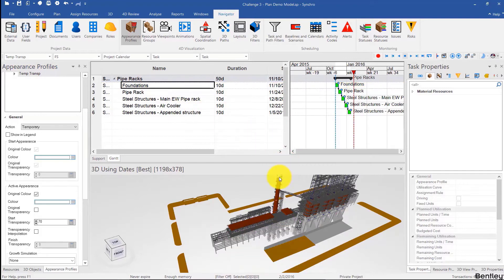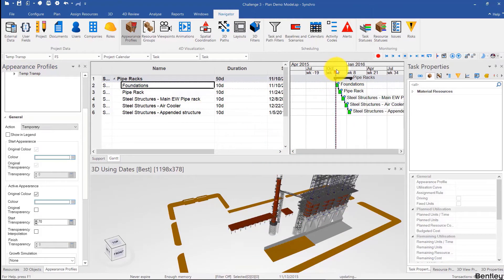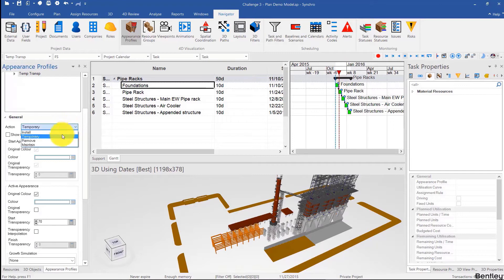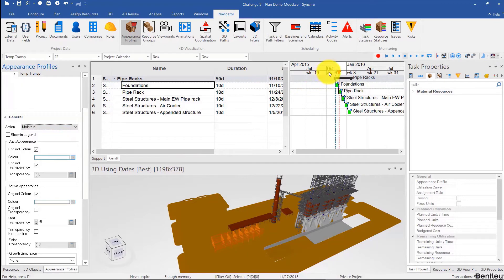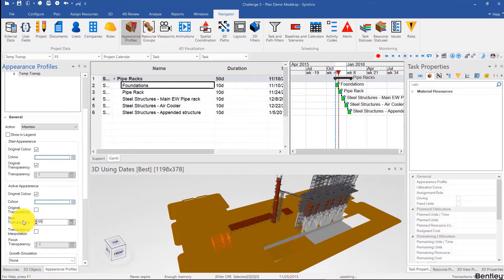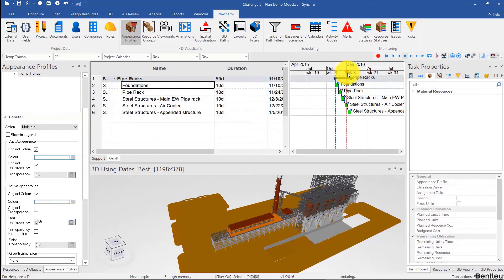I want it to be 70% transparent, and I'll assign that platform to the foundations using Ctrl+Shift+A. I shouldn't have used temporary — I should have used maintain — so I'm going to change that. Now we see that while the activities are going, the platform goes transparent. Maybe that's too much, so I'll change that to 55. Then I'll scrub the focus time through the Gantt chart and we can see what's going on.